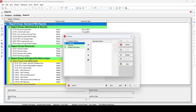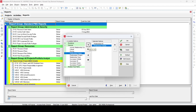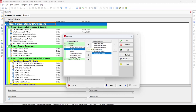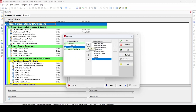In the Columns section, remove all existing columns. Then go to General and add Predecessor ID, Predecessor Detail, Successor ID, Successor Name, and Successor Detail. Also add Critical — which shows Yes or No — Driving — which also shows Yes or No — and Lag, which will show the amount of lag assigned to each relationship.